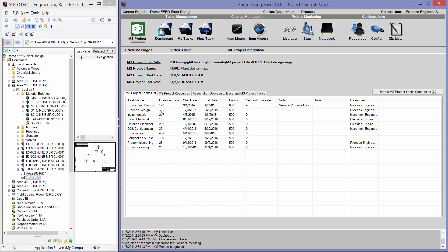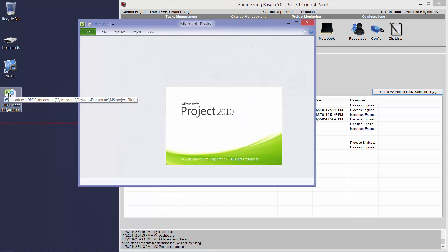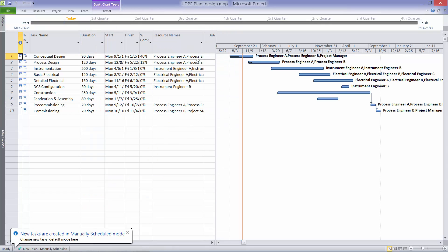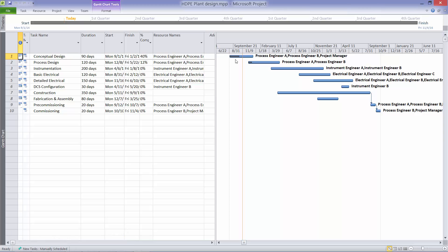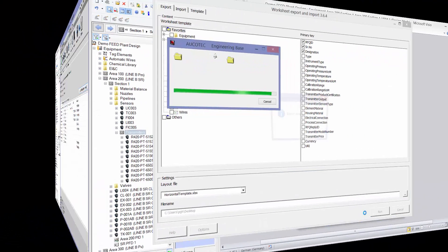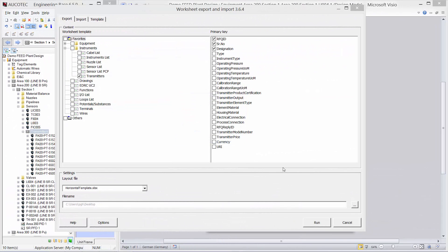And if you want to update the MS project file. At the moment, you can see that the process design is only 10% finished. But when we update it, now it is 12% finished. And if you go to the MS project file. You can see that the process design task is 12% finished. And in the same way, all the people in the project, they can create a task for each other based on a certain workflow. And they can track the tasks and the percent complete of each task based on the real engineering data.